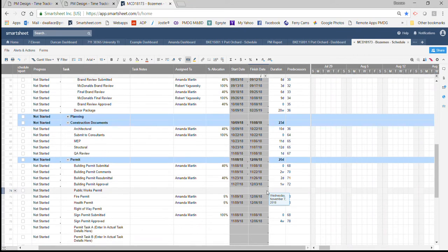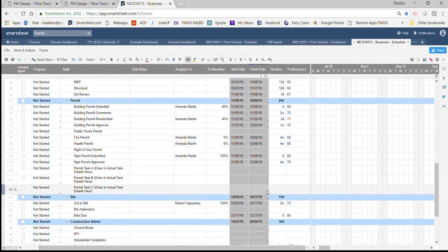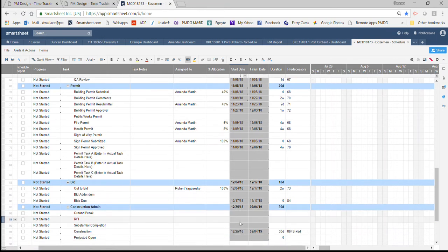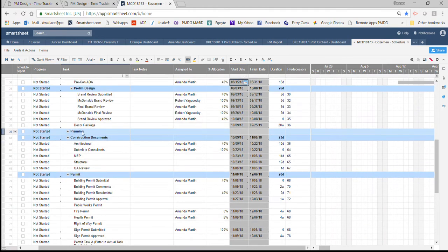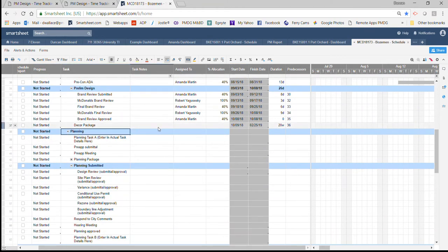Do you remember what the construction start date was? So there currently is no construction start date, and that's why McDonald's wanted me to get started on the timeline, to kind of give them an idea of how long it will take us, because we do here have to go through planning, and planning's going to be at least 8 weeks. Okay, so that's a pretty good example of something that we'd have to do, because our template is set up in such a way that it doesn't show planning, because typically we don't deal with that. Is that like a site plan review, or?